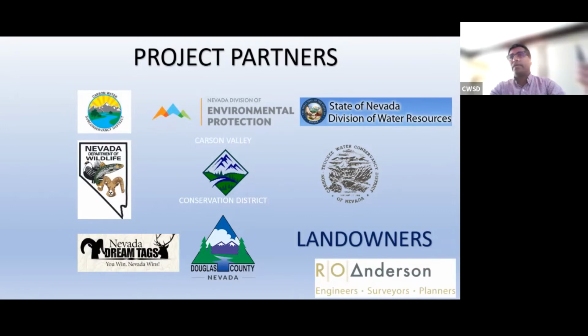During phase 1, we included 4 different sites, and then we got the design done. We went through the bid process, and we quickly realized the contractors were not hurting. So our bids came really high, and we just couldn't build all 4 sites. And Rich went to Douglas County. Courtney just walked in.